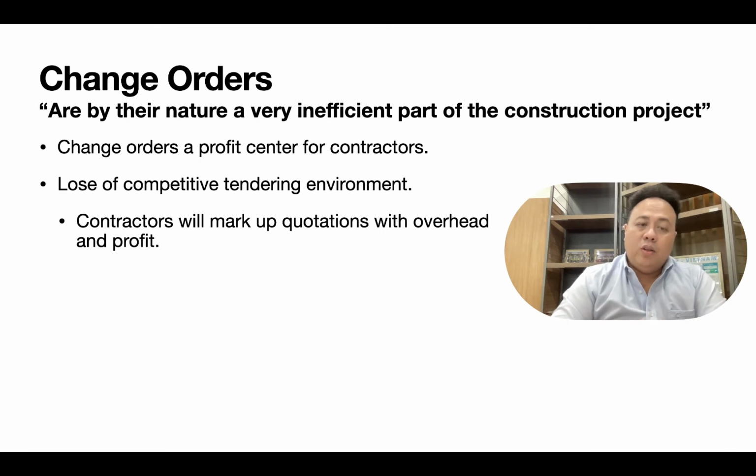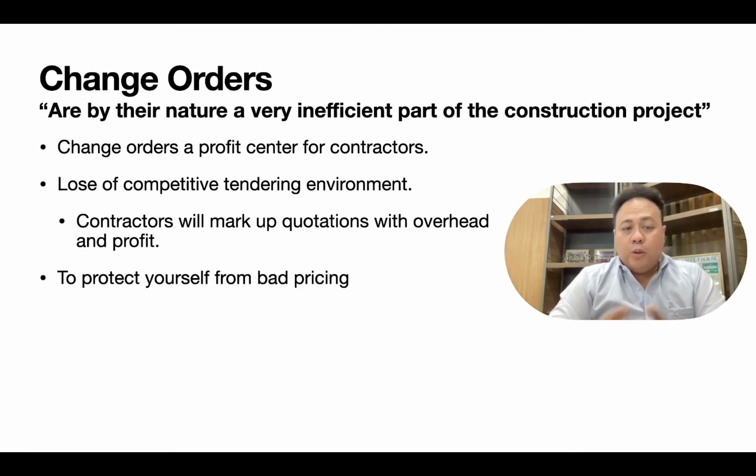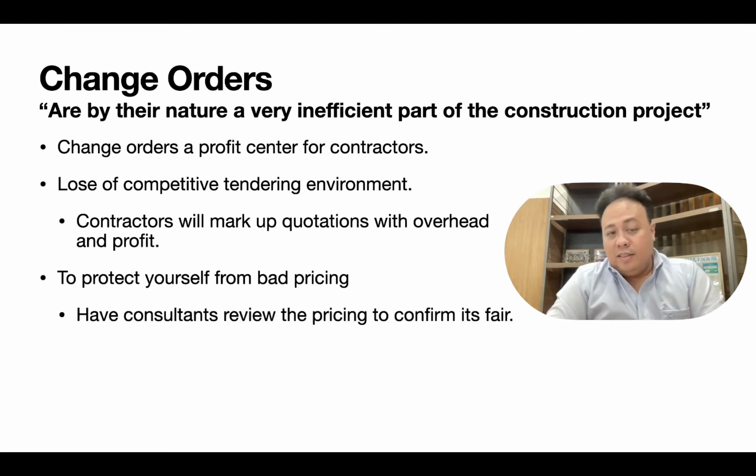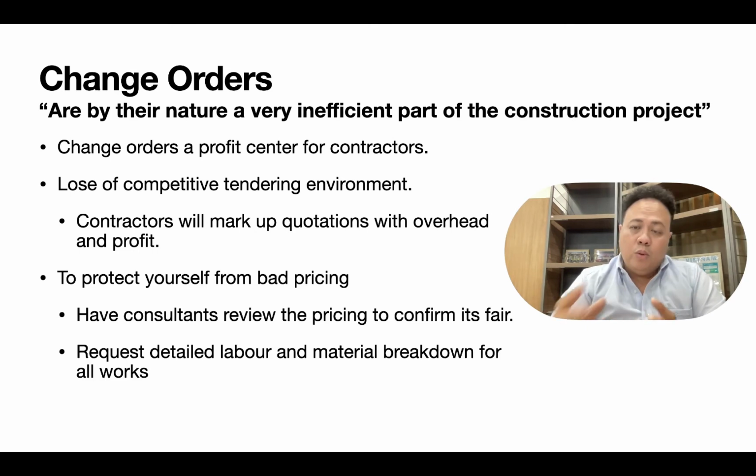So as I said, contractors will mark up quotations with overhead and profits. To protect yourself from bad pricing, this is my suggestion: have a consultant review the pricing to confirm that it's fair. Whatever the contractor submits to you for pricing, make sure you have some qualified person review each quotation. It wouldn't hurt also to request a more detailed breakdown of the costing of all the works, so you can have your consultant review it more thoroughly.